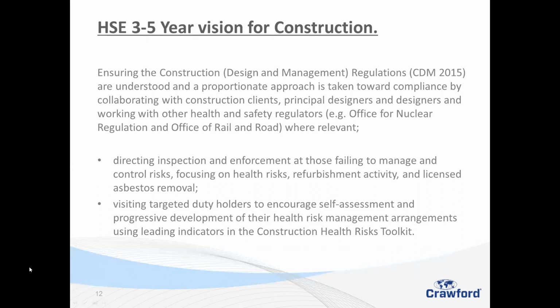Okay, thank you for that question. Firstly, all construction projects in the UK require CDM. Whether you do the CDM or you bring somebody else in to do the CDM, it's up to you, but it's the actual employment of the contractors. If they all actually work for you directly, and it's a domestic property, then you can do your own CDM, or you can bring in an outside body. They won't be seen as a contractor, a health and safety advisor maybe, to do that for you.